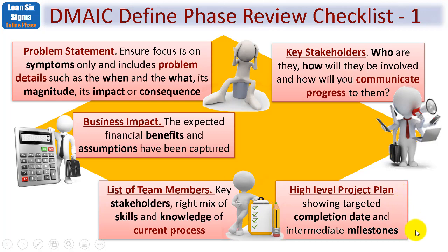Like I said earlier, although Lean Six Sigma isn't about project management, it will certainly use projects as the vehicle for change, and therefore, at this early juncture, after all we're only in the define phase, it can only be a high-level project plan that could be created. And therefore, with our first estimates of a completion date and intermediate milestones, as a minimum, the start and finish of each of the phases of DMAIC.